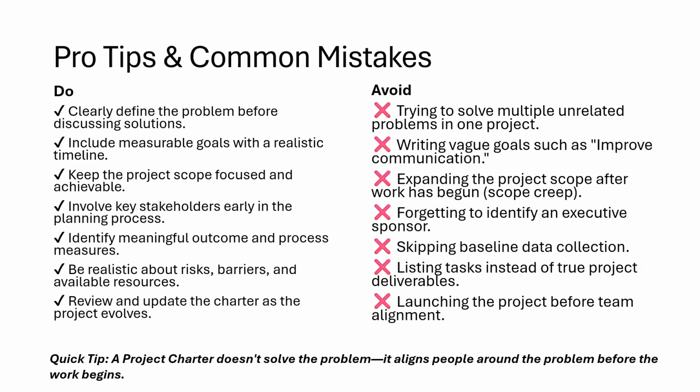Now let's look at a few common mistakes. Avoid trying to solve multiple unrelated problems within the same project. Keep your goals specific and measurable. Collect baseline data before implementing changes. Identify an executive sponsor. And remember that project deliverables are different from individual tasks.